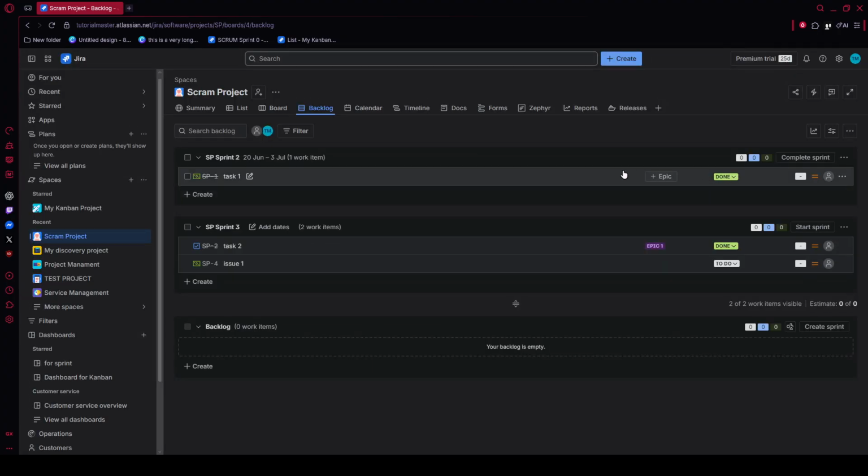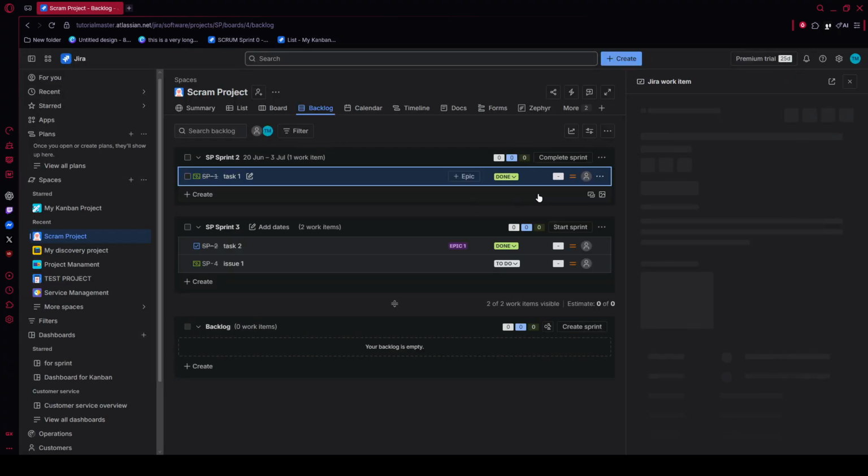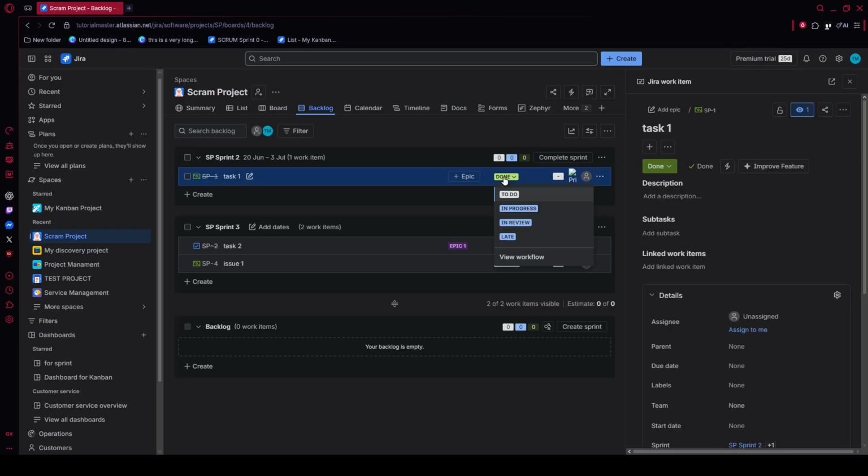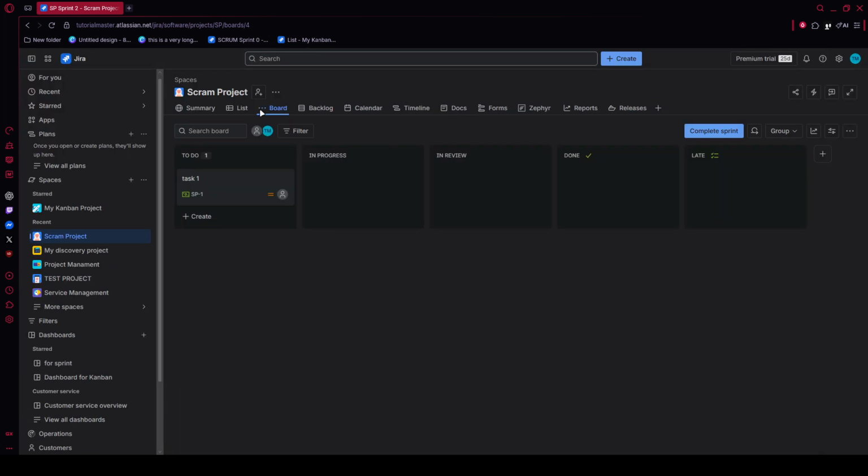Before you wrap up, review the active board carefully. Check that issues appear in the correct columns, confirm the estimates make sense for your team's capacity, and make sure the board looks clean and organized. That final check helps prevent confusion once the sprint is underway.